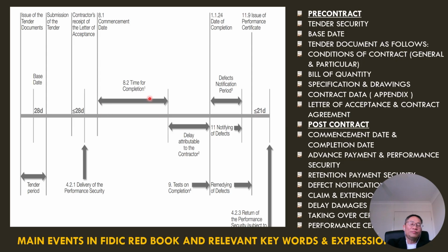And then when everything has been settled in terms of technical matters and the tender price, the employer will award the tender to a successful tenderer. This may be based on quality, or based on tender price, or based on a combination of quality and tender price. Then at that time, the employer issues the letter of acceptance.